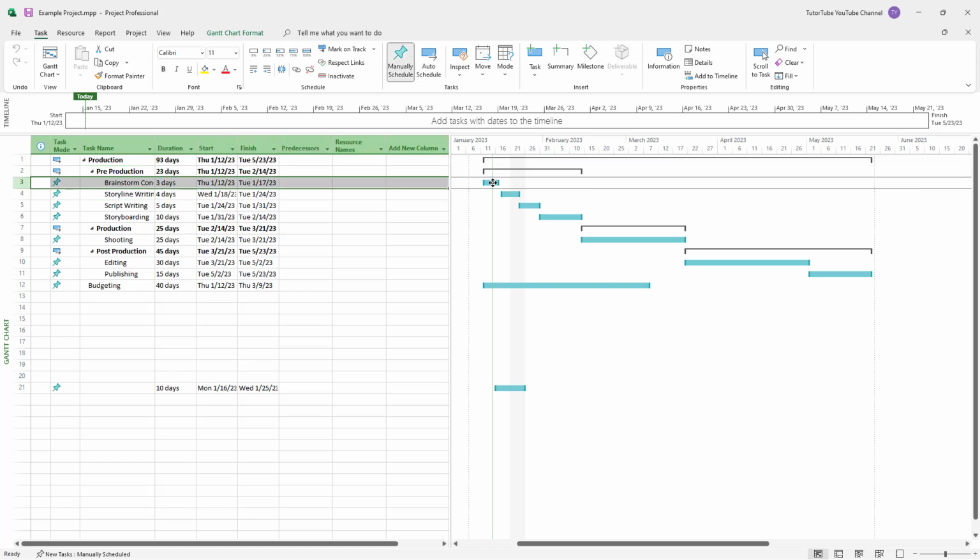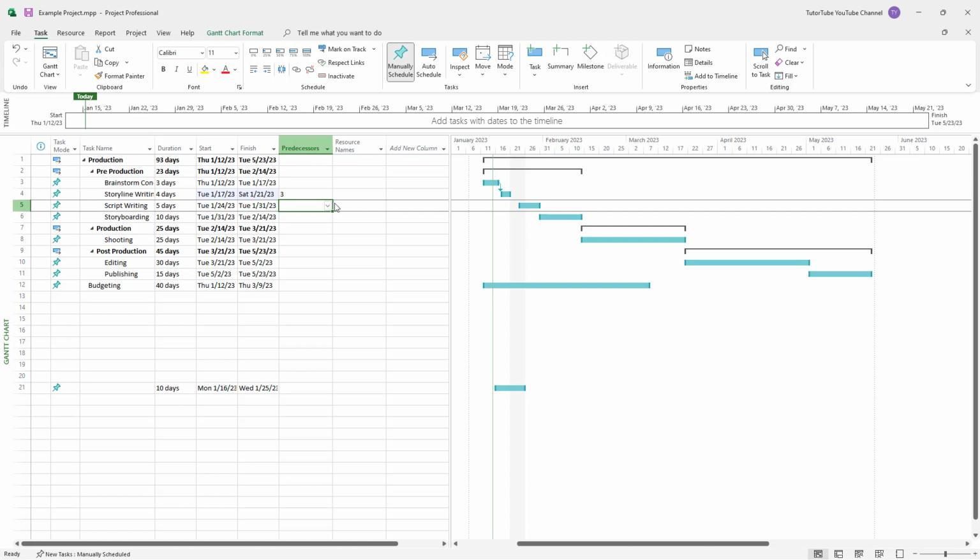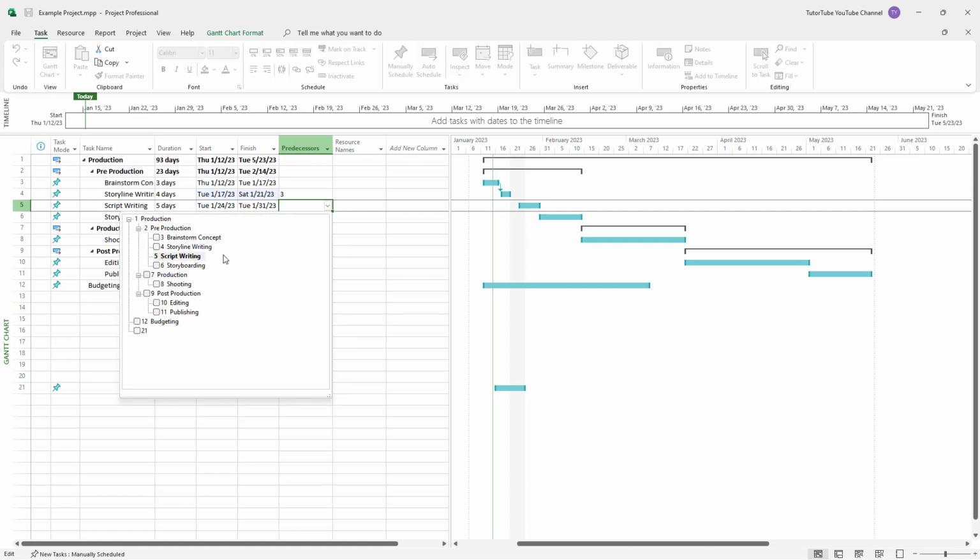So if I want to relate it, all I need to do is click and drag around the task right here, and you see a line. You can go around and link it out with task 4. And you can see that there's this task right here linked around with storyboard. Similarly, you can go around over here and choose which this task is related to as well.